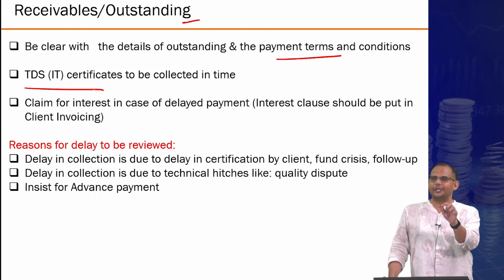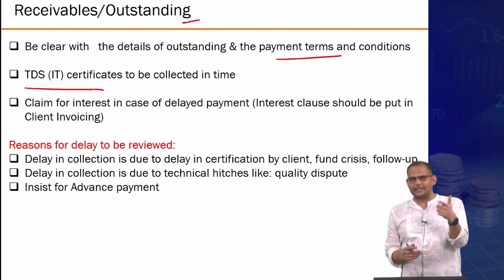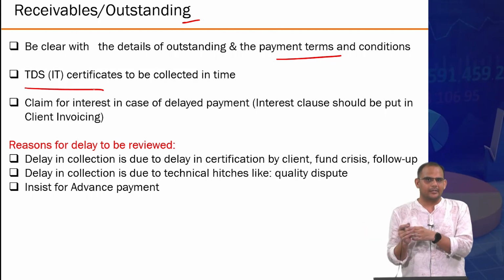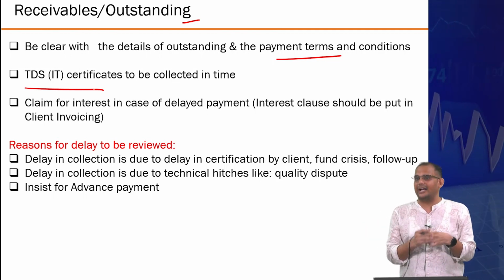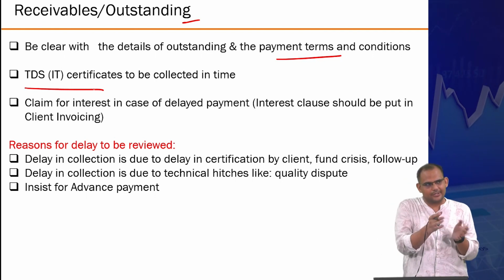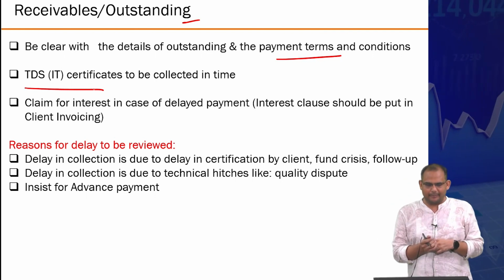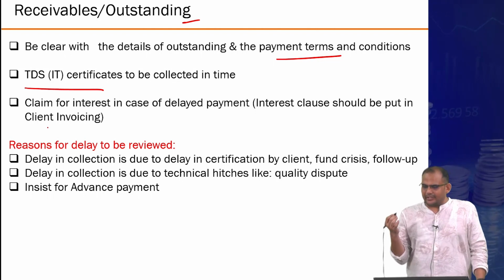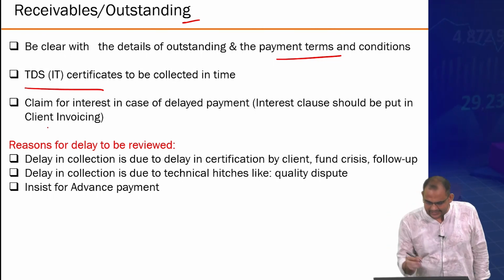So essentially you need to be aware of all these tips and tricks, so that you do not lose some of the benefits that you are otherwise entitled to, or that could have reduced the working capital requirements, right? Claim for interest in case of delayed payment is another of the ideas.